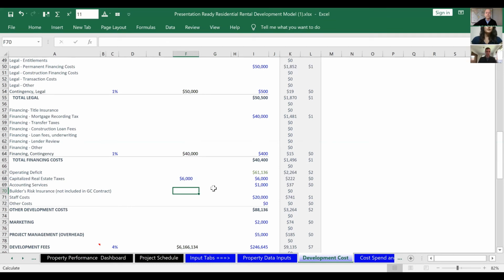And on the real estate as well, depending on how your land was zoned, you have to be careful that sometimes they won't change. Let's say you have something that's office/residential, and you decide to build a residential building, but it was zoned and taxed as an office parcel. You want to be careful that you may be hit with a bigger bill until they switch it over to residential. I've seen that happen as well. Yeah.